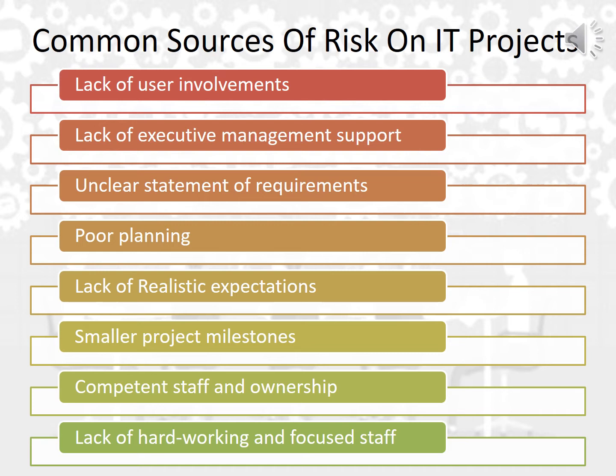done by broad categories of risks, which describe the questions that might include the following categories. My questions should relate to market risk, financial risk, technology risk, people risk, and finally structure or process risk.